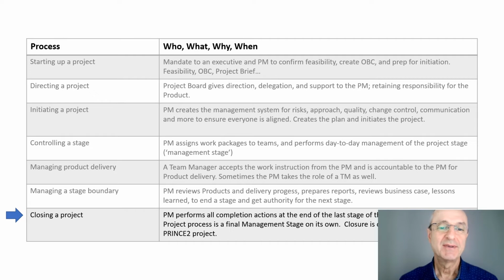Last but not least is the process of closing a project. This can be towards the end of the final management stage when you're preparing to get to the end of the stage and you're doing the managing the stage boundary piece, to use that time to consolidate everything, and if it's all very straightforward, then put together your closure pack as well.